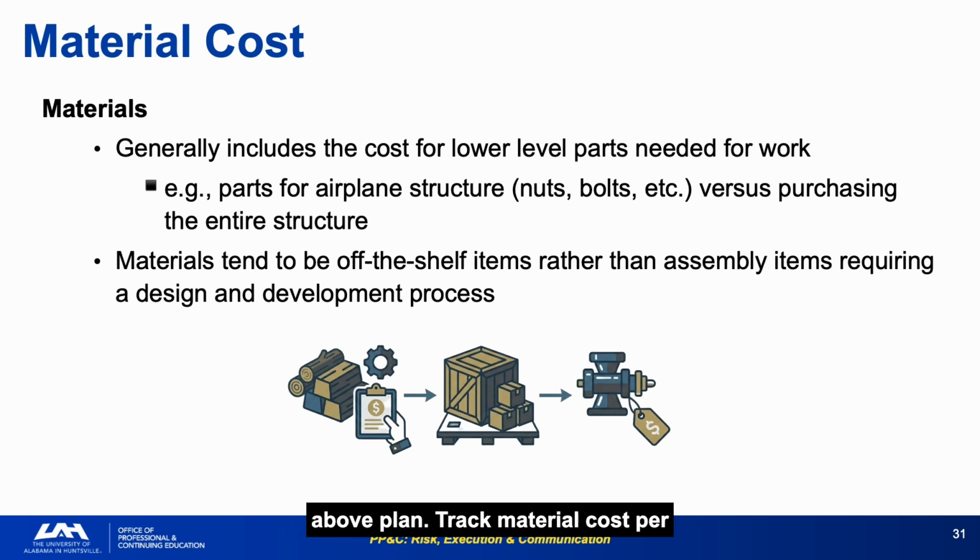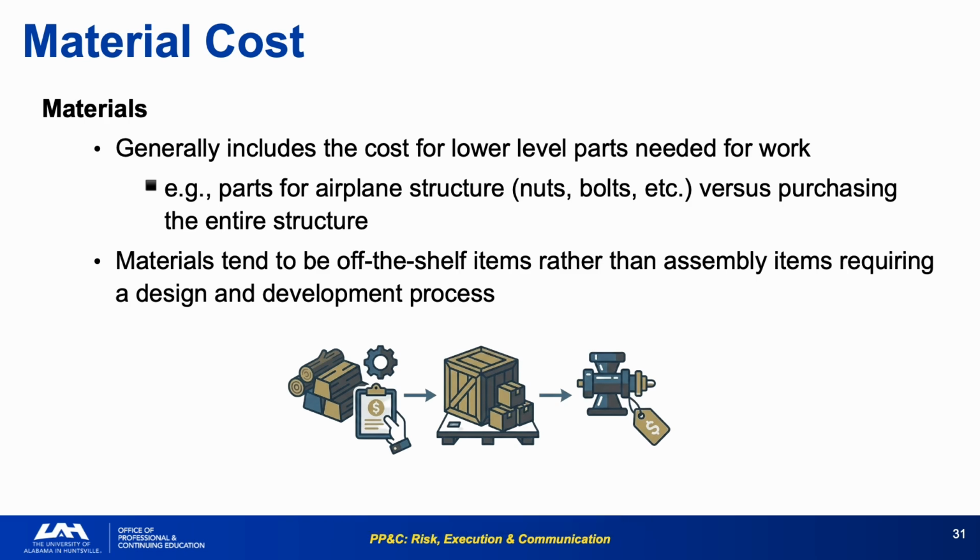Track material cost per unit or per delivery against the proposed estimate. Significant cost growth in material lines often traces to technical problems at the component level that have not yet surfaced as formal program risks.